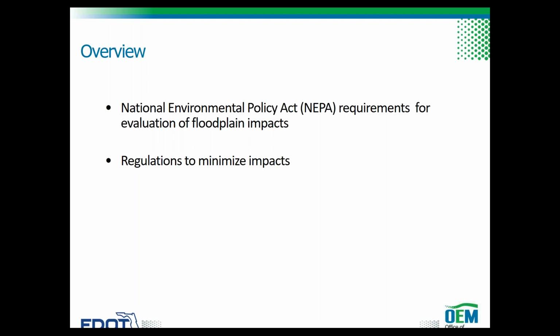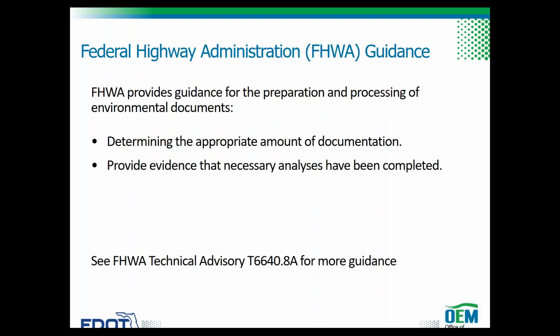The intent of these requirements is to avoid or minimize highway and land use development encroachments that reduce storage or increase water surface elevations within 100-year floodplains or base floodplains. Location hydraulic study required by Title 23 of the Code of Federal Regulations, Part 650A, must be prepared commensurate with the level of encroachment to allow consistent evaluation and identification of impacts.